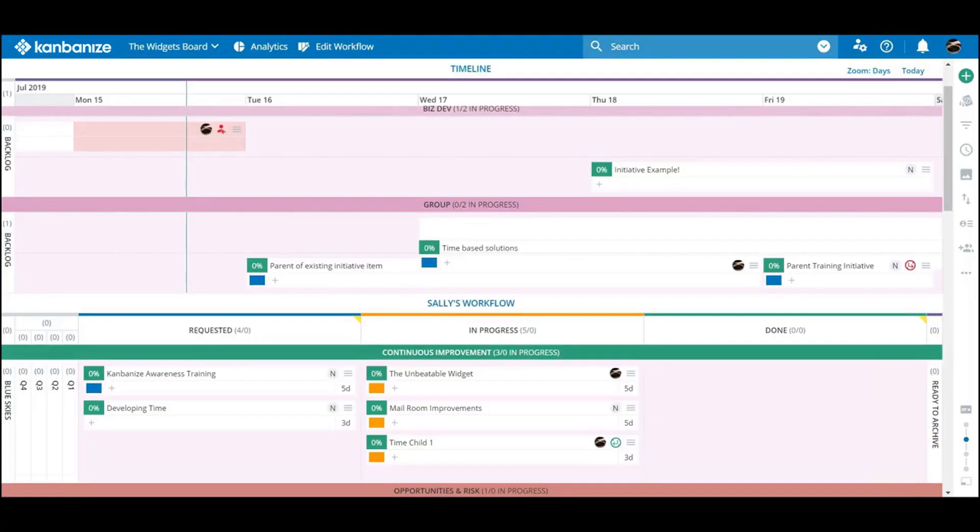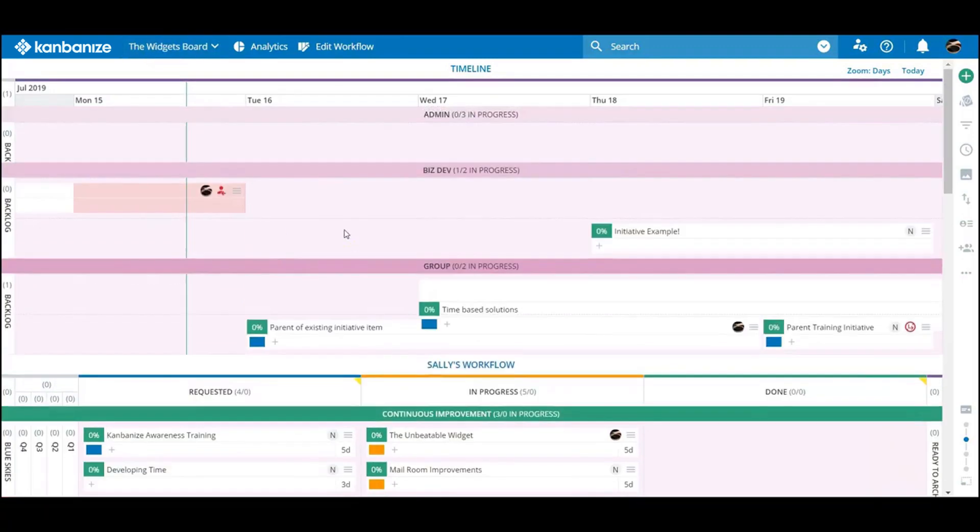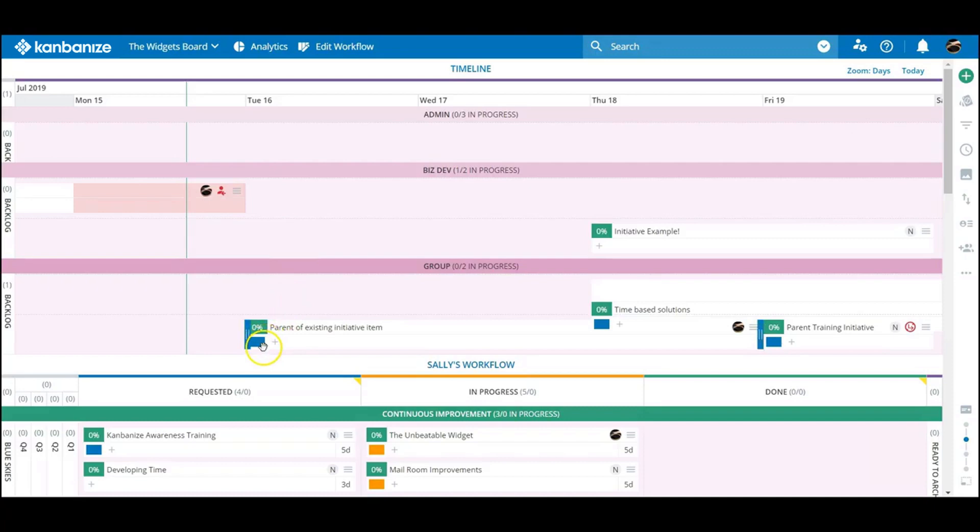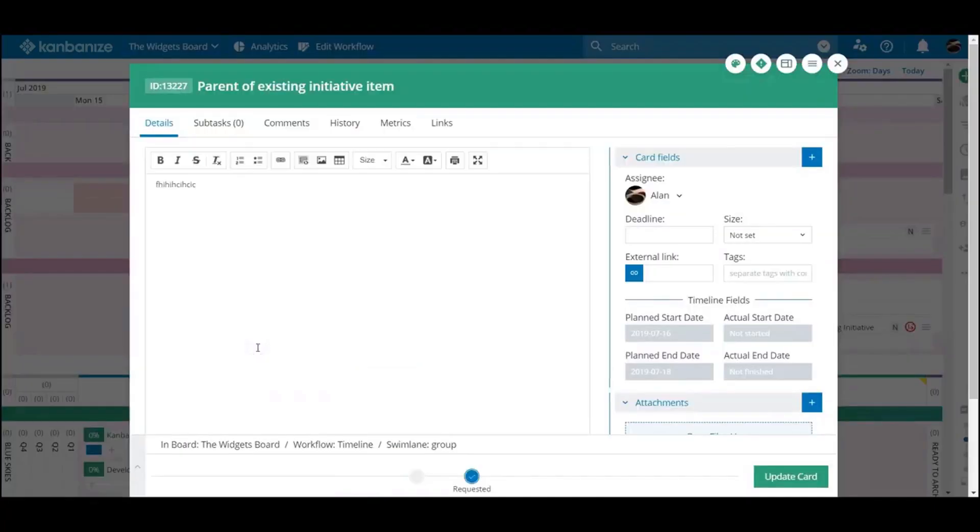The additional fields are automatically filled in and updated in respect to the timeline's endpoints. The timeline allows you to structure quite complex schedules so that you constantly have a sense of time over results. You can also size the child initiatives so that the percentage of completion is displayed in the top banner as normal.